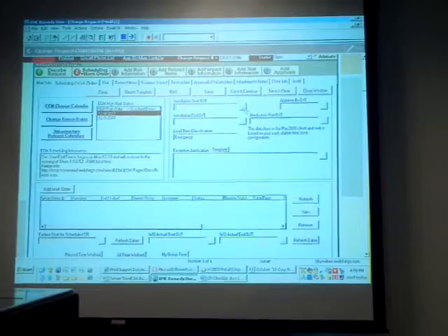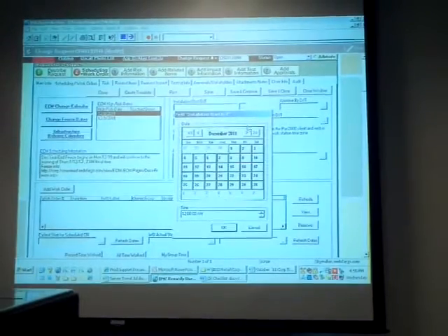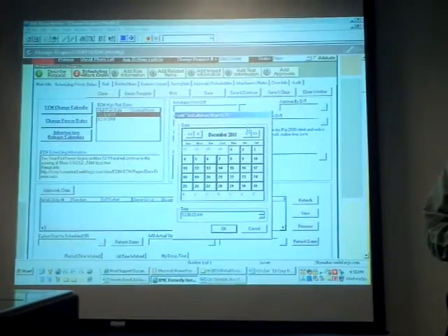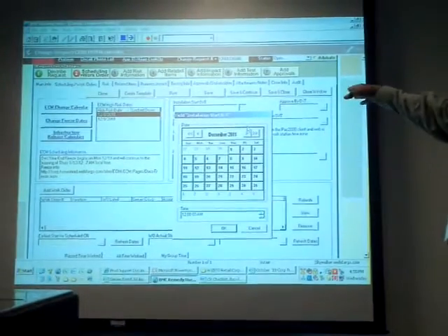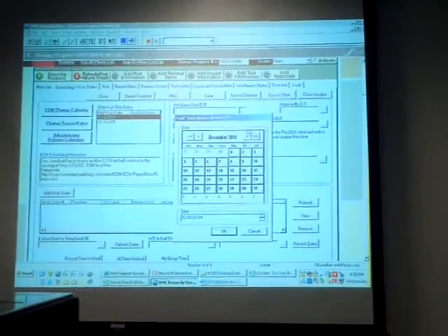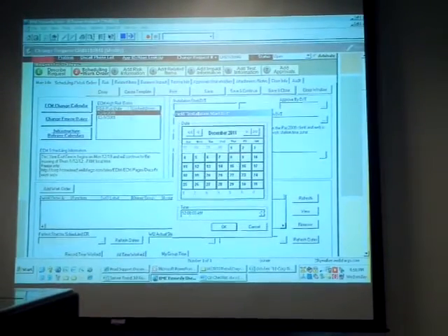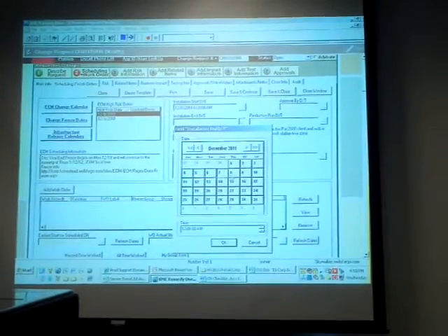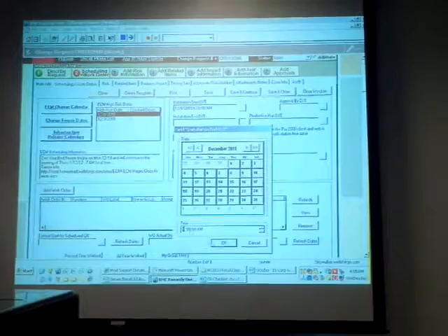So you have to ensure you go through each of these tabs using save and continue. Now, installation start date: if the change has already occurred, you would indicate the time when you actually implemented the change. If it's in the future, indicate that future date. It's very simple. So let's say I put in tomorrow at 6. This one is 8.